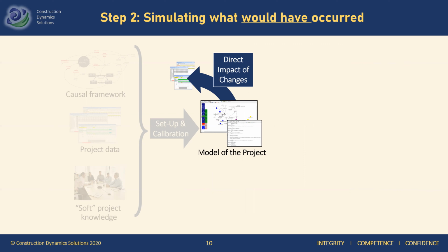All those disruptive events that were caused by the other party, typically the employer, the demobilization of the workforce, the design changes, all of that we remove, and we don't touch the characteristics of the project, of the manpower, all of that stays the same.